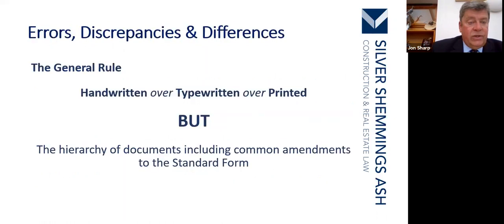But the general rule, handwritten, yes, is preferred over typewritten or over printed. So if you have made handwritten amendments, perfectly understandable. Pressure to get in a tender, for example, etc. Just make sure both parties try and sign them. Difficult, I accept entirely in our current circumstances, but at least there should be, I would say at the moment, an exchange of emails between parties referring to the specific provisions and agreeing to any handwritten amendments that one party's made.